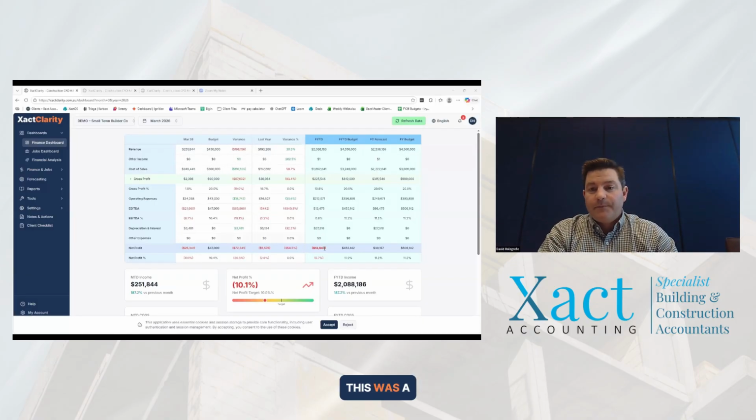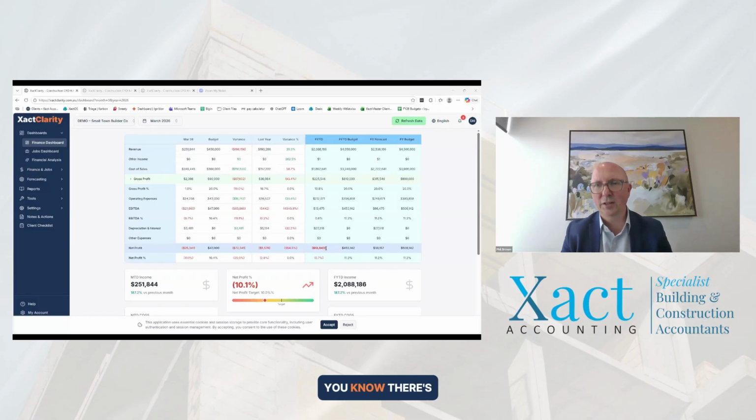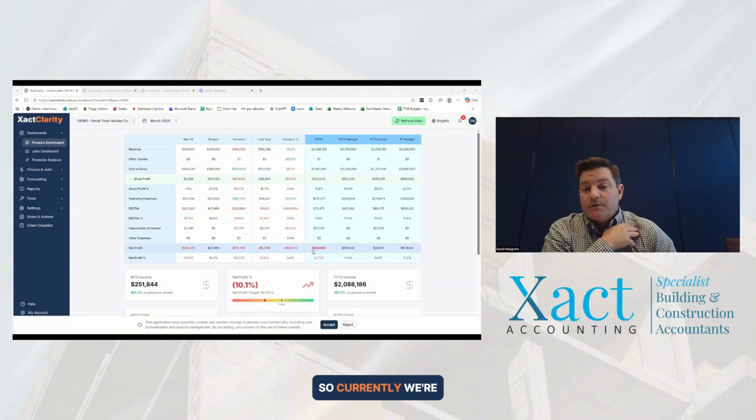Okay. And now, if this was a particular client of yours, Dave, this is not looking good, right? We had a budget that we'd locked in at the beginning of the financial year for 4 mil financial year to date. It was 4.5 for the full year. I was hitting and hoping that I was going to drop 500 out the bottom. For whatever reason, as you say, delays, weather, all the rest of it. We're now forecasting a loss at this point. That's right. So currently we're tracking a loss. We're hoping to come just back over break even.